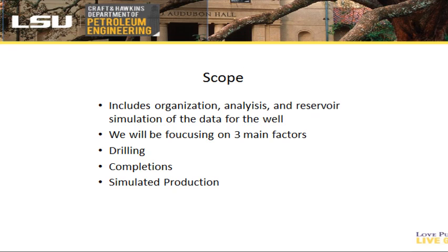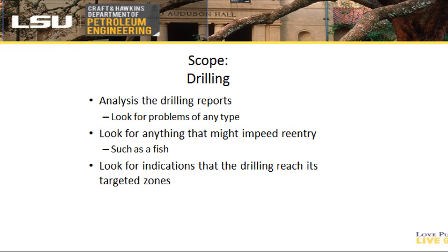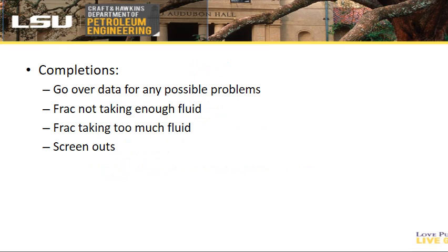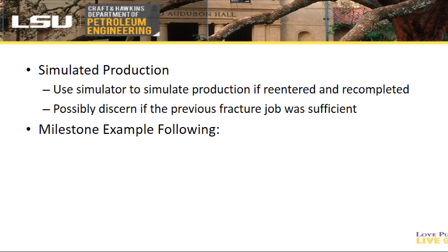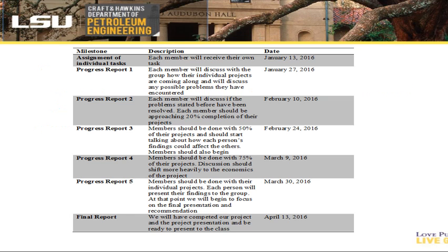The scope of our project includes the organization, analysis, and reservoir simulation of the data for the well. We will be focusing on three main factors: drilling, completions, and simulated production. We will be analyzing drilling reports, looking for problems of any type that might impede our re-entry into the well, such as a fish. And we will also be looking for indications that the drilling reached its targeted zones. For completions, we'll be going over data for any possible problems: frac not taking enough fluid, frac taking too much fluid, screenouts. We will be simulating the production if re-entered and recompleted, possibly discern if the previous fracture job was sufficient. This is our milestone schedule for next semester.